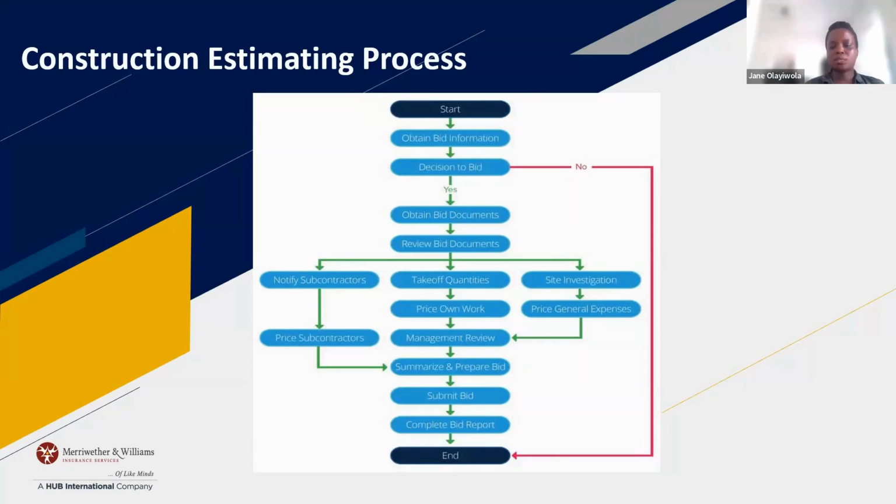So is that something that you put in the estimate? Say your operating costs for the general conditions are like $1,000 a day? Absolutely. We go ahead and put those general conditions in the change order. Absolutely, especially if this affects the critical path of your project and the overall schedule would be delayed, then it's absolutely within your right to input. In fact, you should be doing that, otherwise you're eating that cost. If it's going to affect your overall schedule, you definitely want to input that.